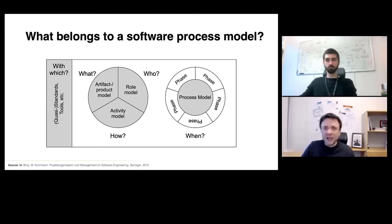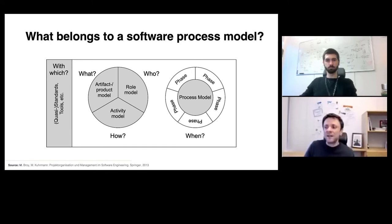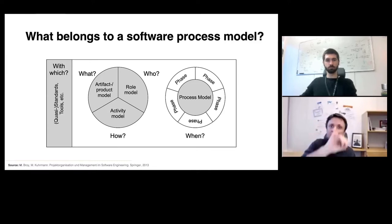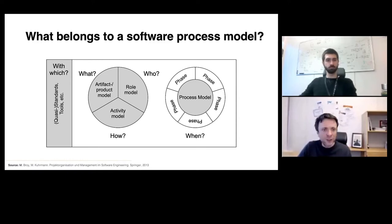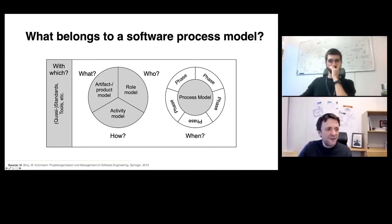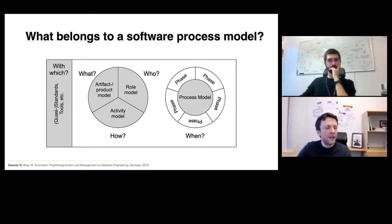Beyond these four elements, software process models also define how phases are interwoven — in a plan-driven waterfall approach, an iterative approach, or iterative incremental approach. Every software process model typically also includes supporting material like documentation templates or tools. Every project instance must comply with the software process model, but not everything dictated by the model has to be done in every project — this is why we tailor the model at the beginning of each project.